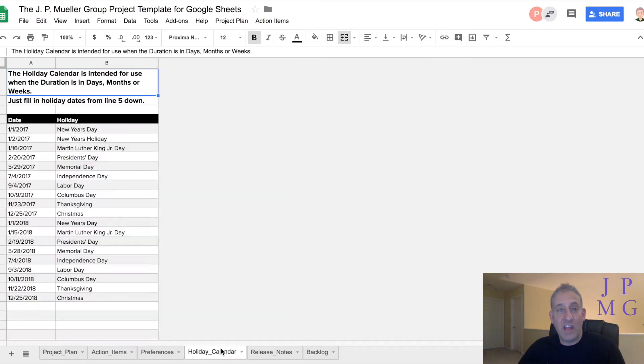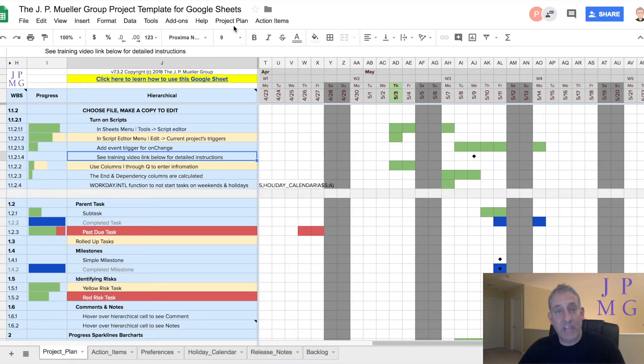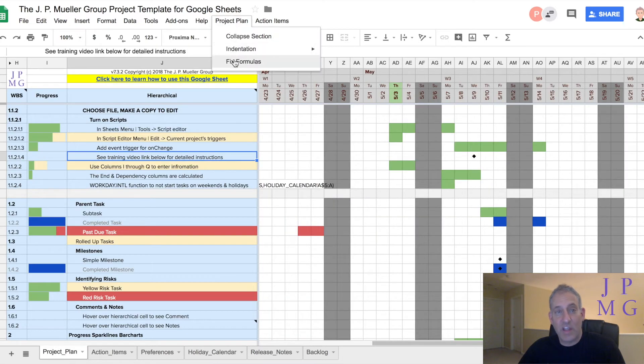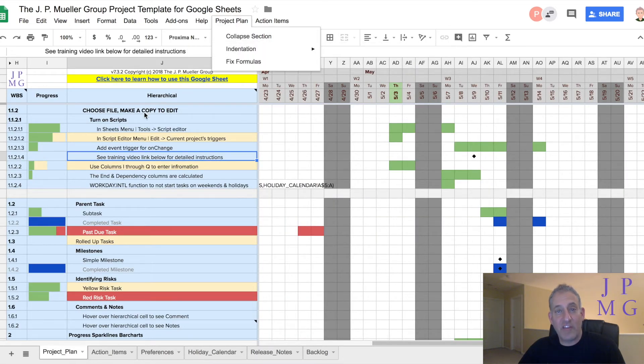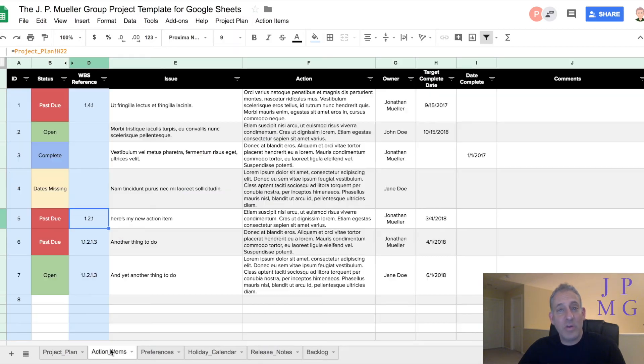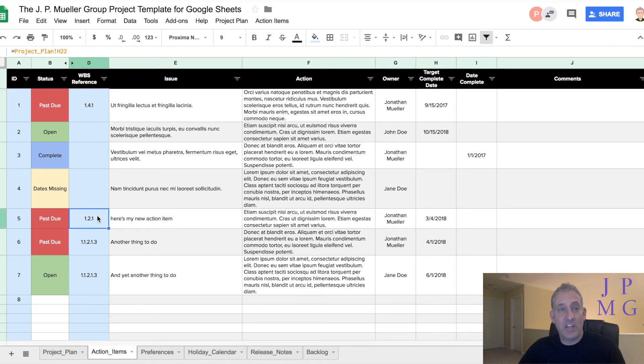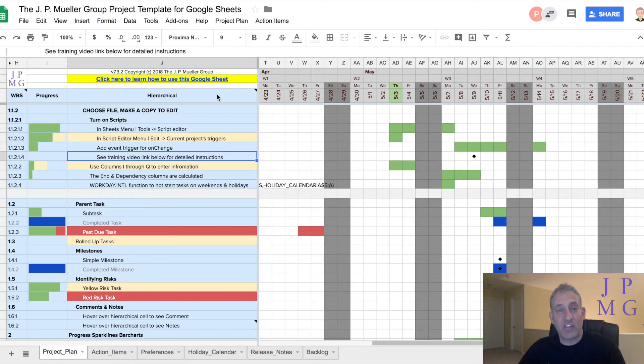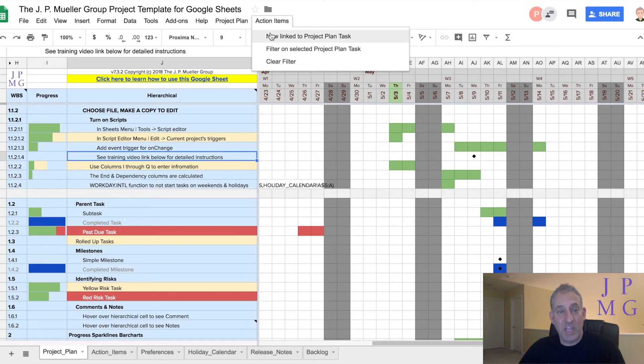You can indent and outdent tasks, as well as collapse whole sections. There are visual clues that help you identify problems and opportunities. It even includes an action items tab, where you can link action items to project tasks, so that you can quickly drill into details while reviewing the plan with your team.